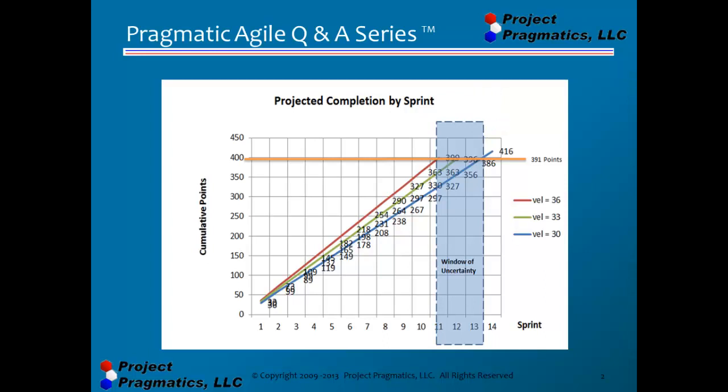It's a very simple linear projection of how fast the teams are moving. This should change when major things change. Team members change — that means the velocity changes — and that means this should be re-plotted similarly. This was the backlog size at sprint 3 or 4. That backlog can change in size, go up or go down. So when you see a significant change, you should re-project these numbers also.